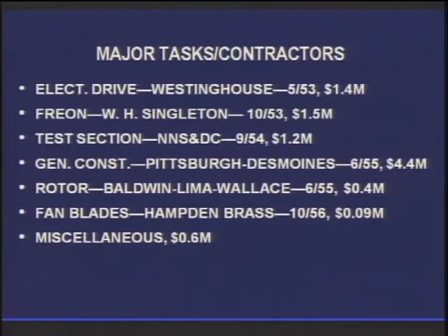So everything is going along now. Getting back to staffing the job, start putting the drawings and specifications. On the left here I have the major tasks. In the middle I have the contractors. And on the right I have the date the contract was awarded and what the price was. And this price is the capped price, not the starting price. As you might imagine, over the time of the job, all these contracts crept up to that cap price, but the total didn't exceed that 9.6 million.